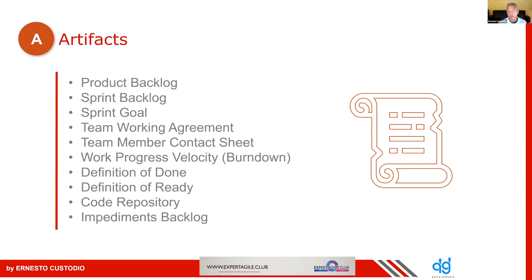Definition of done, definition of ready, having your code repository if you're dealing with software, and your impediment backlog. The impediment backlog captures the problems you're seeing on an everyday basis, making sure those are being addressed periodically. You need an actual artifact that has your impediments. What other artifacts are you using?